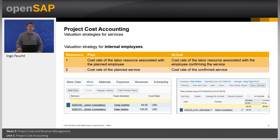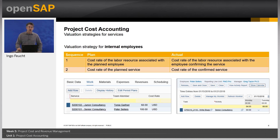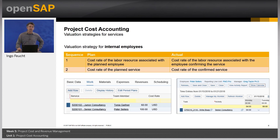In both cases, the system first looks for the cost rate of the labor resource. The labor resource says who is doing something. Labor resources can be defined in Business by Design for the combination of cost centers and job. Each internal employee is assigned to a job in HR and belongs to a cost center, so each employee has exactly one labor resource. Usually, you would group several people together into one labor resource. If no cost rate is maintained for the labor resource, or if in an early planning stage no labor resource has been assigned yet to a work package, then the system uses the cost rate of the service, which describes what is done.